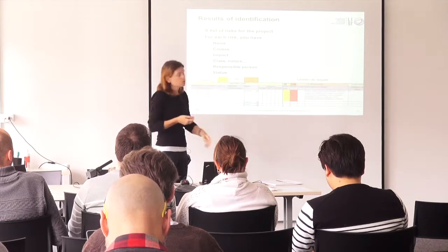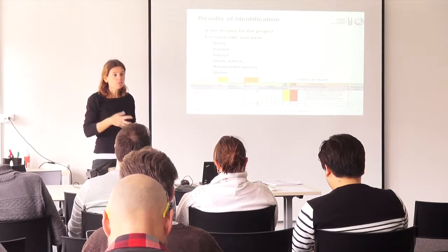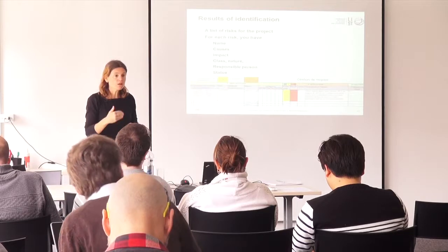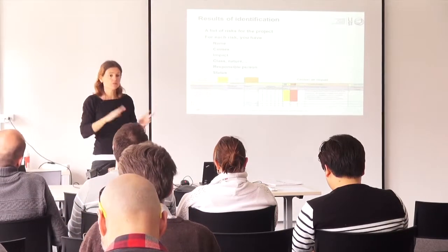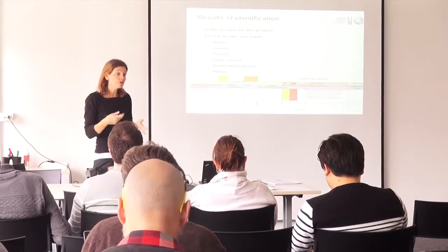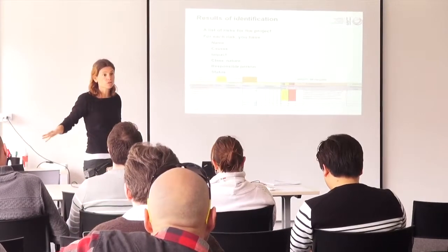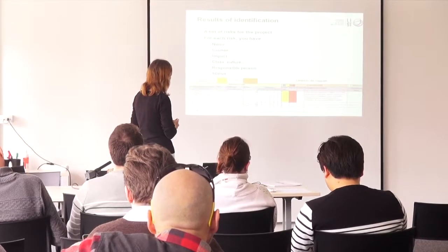And a status. You could have a list of risks, and at some point in time, the risk is not there anymore on the project. So you can have a risk that is closed. It's not going to happen. It has not happened, and it's final. Or a status that says it was a risk, now it's a problem. It has actually occurred, and we need to treat that as an actual problem on the project.